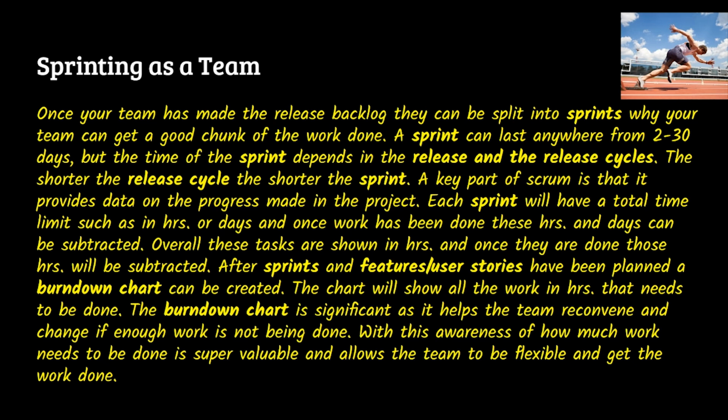And once I finish one of those tasks, I subtract however many hours I originally put for that user story from the overall sprint hours. This helps me track how much work has been done. Now, the real way this is shown is through a burn down chart, and it's really useful.